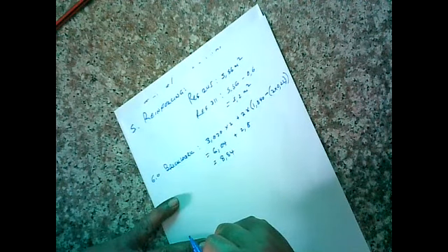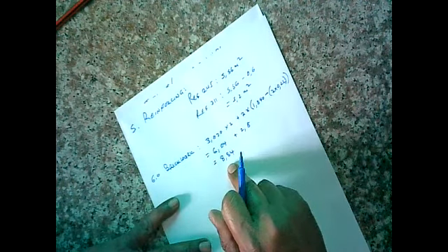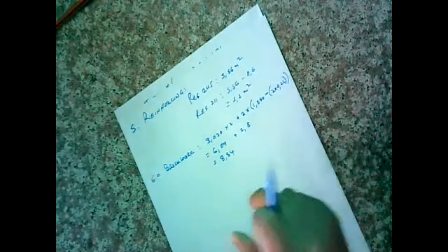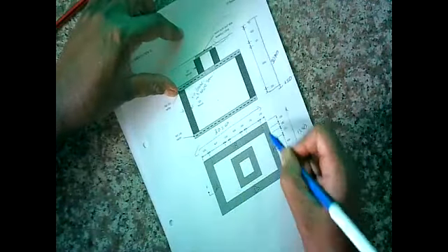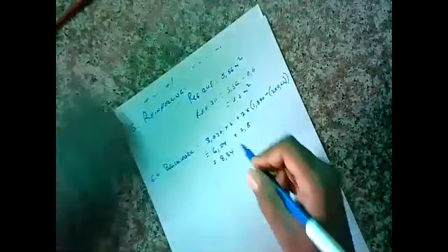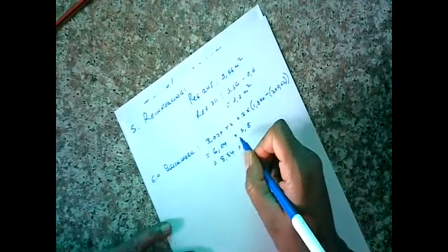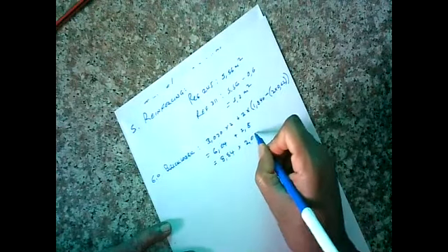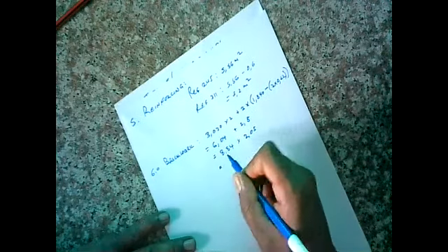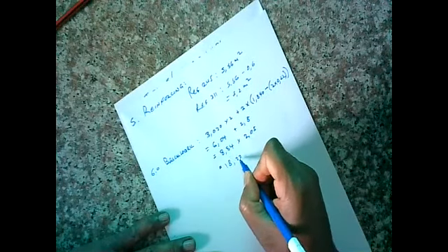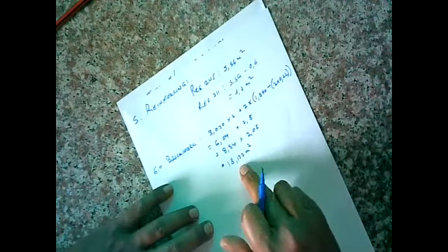What is that? That would be the perimeter of this entire thing. What is the height? Times the height of 2.05, and we get 18.22 meters squared of all that brickwork.